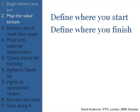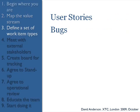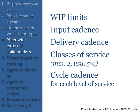How do you get started? There's actually a nine-step process. First thing: you're going to begin where you are, but you're going to agree to goals. Get the stakeholders, team, and management together and say 'what are we trying to accomplish?' — agree on the intention and what you're trying to maximize. Second: map the value stream. You need to build one of these — you need to see where you start, how you do your work, and how you finish. Understanding this makes a big difference.